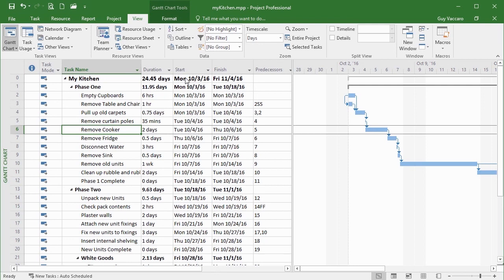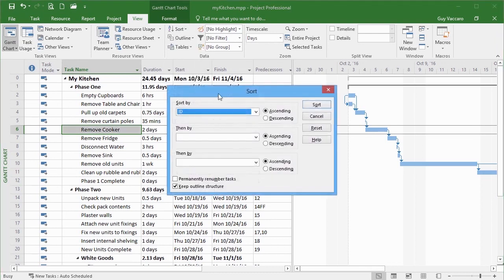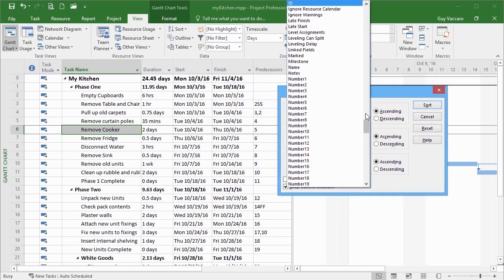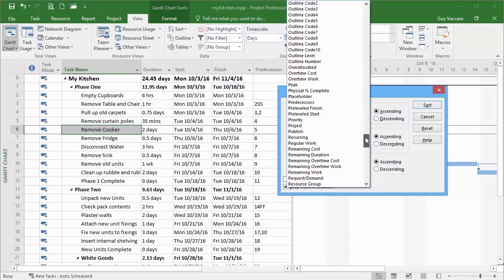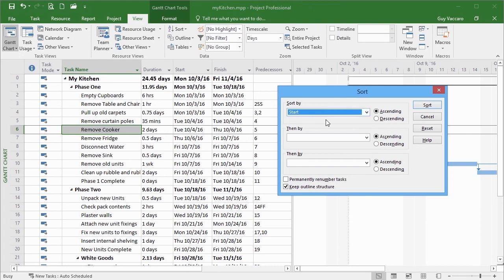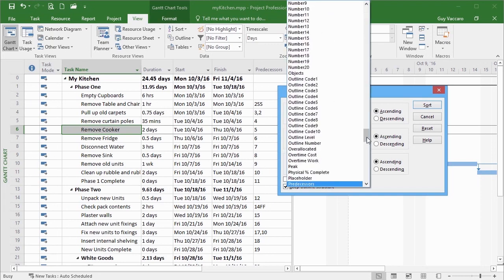You're not restricted to just the five predefined fields. We can go into Sort By, which gives us a normal sort dialog where we can do up to three columns of sort. We sort by one column, and if there's a match, then by a second column. In our case, we could sort by start date — you get access to all the project fields, so there are quite a few of them. The start date field is called 'Start.' Where there's repetition in the start date, we'd then like to sort by priority.